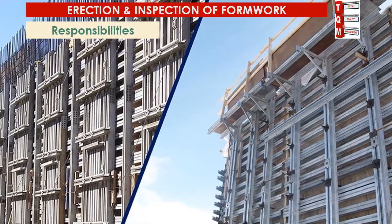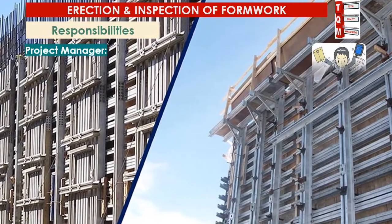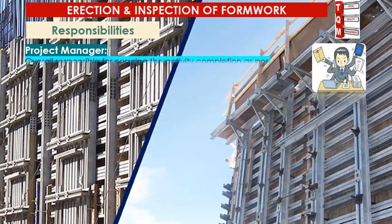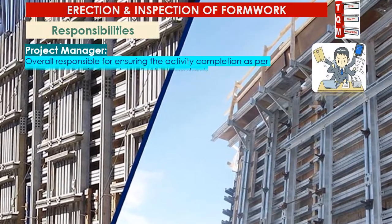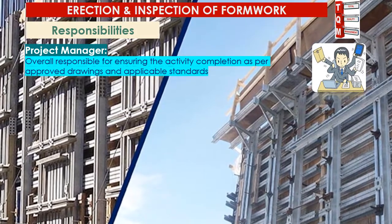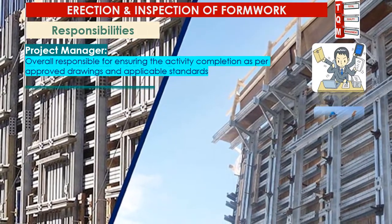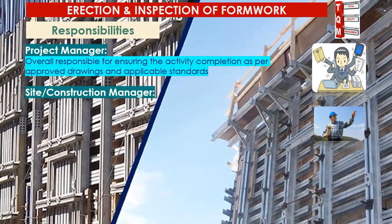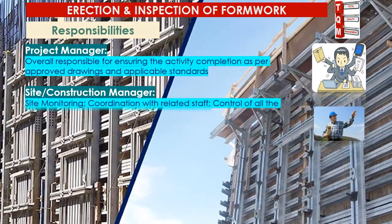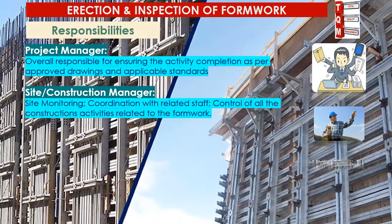Responsibilities of the project team include the following. The project manager is overall responsible for ensuring activity completion as per approved drawings and applicable standards. The site or construction manager is responsible for site monitoring, coordination with related staff, and control of all construction activities related to the formwork.